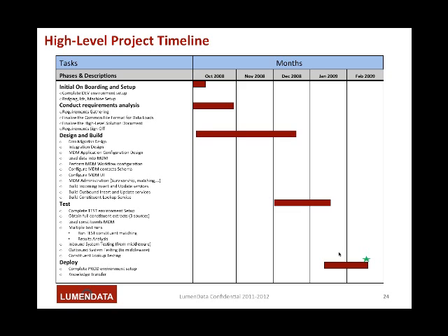For example, if an MDM implementation is being done by itself, standalone, you can generally get the system in and up very quickly. If it's being done in conjunction with a very large system upgrade, let's say a student system upgrade or an HCM upgrade or new install, then we would synchronize our project to that project, and the reality, folks, is those things tend to take time. So when the larger project takes time, then these MDM implementations take time. Realistically, we're talking of 5 months to 1 year time frames.